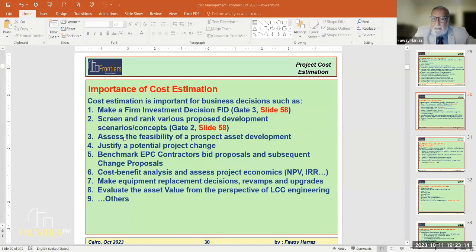But if he receives 1 billion and 500 million, 1 billion and 600 million, this is way above the reasonable market estimate. In this case, it appears that the bidders have colluded, يعني حصل تواطؤ, and they are rigging the bid, shaping it in a certain direction from the original intent of open invitation.